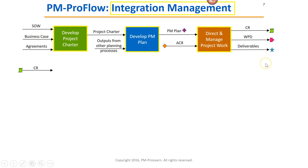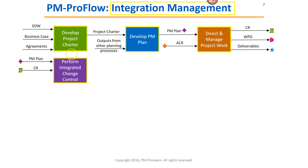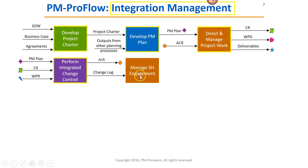Change Requests is an input to a process called Perform Integrated Change Control. It's purple because we're now in monitoring and controlling, and it's highlighted because it's still an integration management process. Perform Integrated Change Control needs the project management plan and Work Performance Reports as inputs. The output is Approved Change Requests, and the connector links it back as an input to Direct and Manage Project Work. The Change Log is also an output of Perform Integrated Change Control, and it becomes an input to the executing process Manage Stakeholder Engagement — which is not highlighted, as it's in the Stakeholder Management knowledge area.